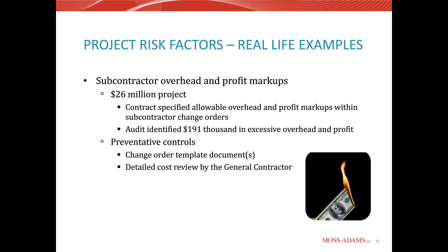So having change order template documents at the very beginning of a project could really prevent those types of overcharges, and it really helps to streamline the process, knowing that each and every subcontractor is going to be submitting to you the same form document.